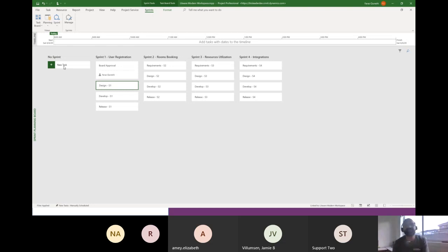If you have new requirements that are part of your backlog, you can capture them here. Right, so I can capture a new requirement here easily. And then if I don't know when it is going to be delivered, I can't assign it to a sprint. I can leave it in the backlog without a sprint.